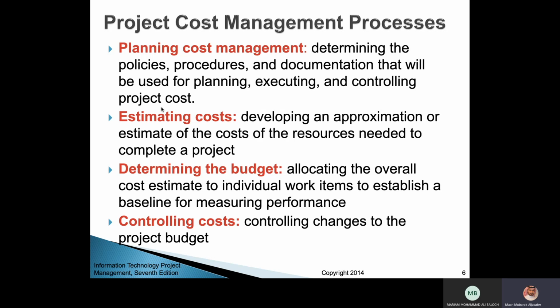In scope, you develop the work breakdown structure, and at the same time, in time, you assign some dates to all the subdivided tasks. And now, from the perspective of cost management, you also need to add the budget for these items.